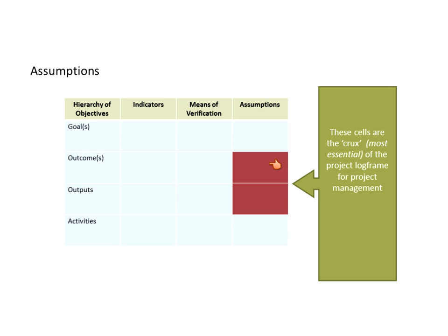But really, the assumptions are the most important, and here's why. First of all, the assumptions are important because of the horizontal logic, that you have to have assumptions in order to complete the logic. The assumptions are the positive conditions, the positive statements that must be true in order for the logic to be complete in the log frame itself.